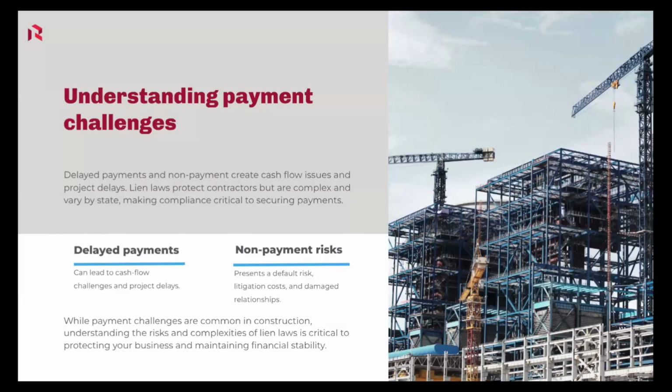As a contractor, you have an obligation to ensure compliance before issuing payments. That means verifying all sorts of necessary conditions, such as validating proper progress, making sure the proper retainage is being handled, and validating insurance certificates. If the vendor or the materials provider doesn't have up to date insurance or certificates, you have to make sure you get those, because issuing payments could expose you to liability.